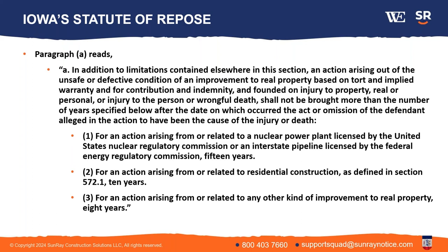And the statute of repose is different than a statute of limitations, in that the statute of repose starts to run and is not tolled or delayed by a lack of knowledge of something. So for example, on a commercial construction project, if it's 9 years, 10 years down the road, and nobody knew of this defect, and nobody could have known about it, it was a hidden latent defect, and it didn't arise until 10 years after the project's done, the statute of repose is going to eliminate that claim, even though nobody knew about it. In the statute of limitations context, those can be tolled or delayed based on the lack of knowledge. Okay, so the statute of repose is a big defense against these kinds of claims once the period runs.